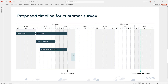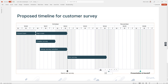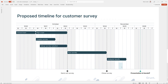Then we need to run the survey and I want it to run for two weeks. I'll type the label. Then I'll add another milestone where we can say 'Close Survey' and I'll move it slightly over. The final step is to analyze our results, and we're probably going to spend a few days on that. I also want to prepare my final presentation, so I need another row. If I hover at the leftmost side of the Gantt chart, you can see a plus icon that appears — clicking that will insert a new swim lane, and I can then add my final activity there.